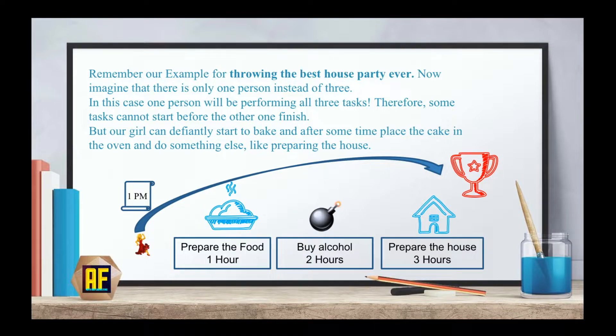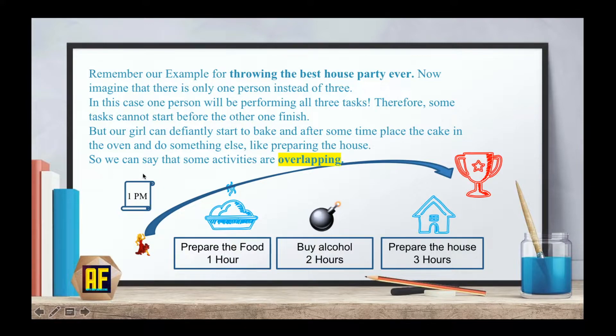But our girl can definitely start to bake and after some time place the cake in the oven and do something else like preparing the house. Therefore, we can do two activities at the same time. It is just a matter of managing our time properly. So we can say that some activities are overlapping.